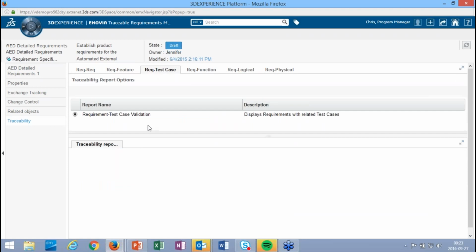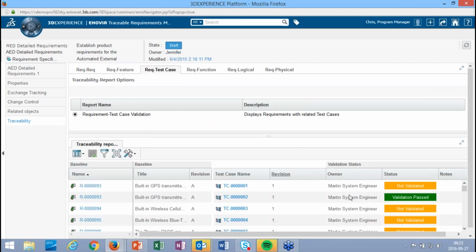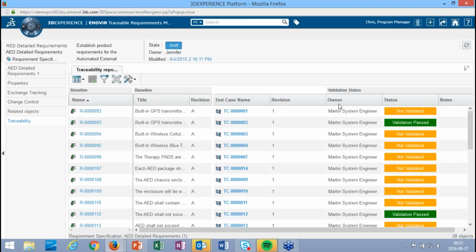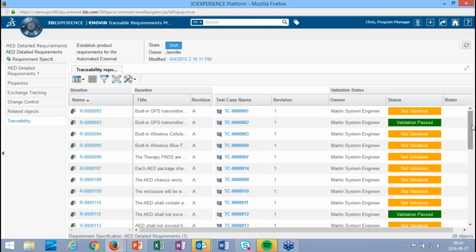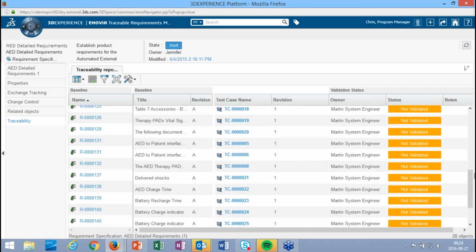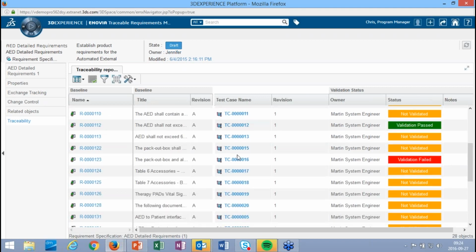And if I want to track requirement to test, I get my traceability report, and we can drill down into the current mapping between input requirements and the final test validation, and see why aren't we done yet? What are the open issues, if there are any, and if that's the expectation for the next gate.